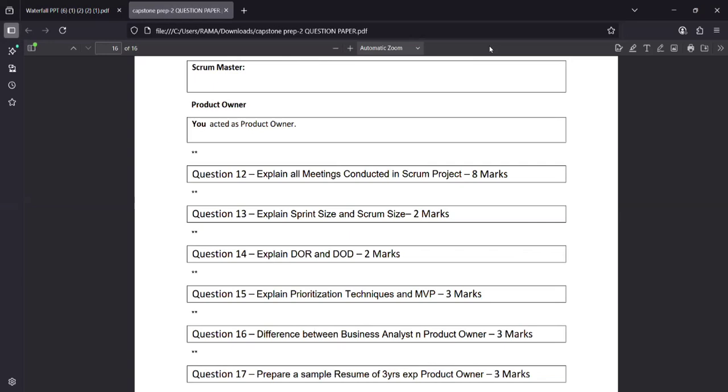From the 40 user stories, which are the most important to deliver first? The team will discuss and decide to deliver those user stories in sprint one. Let us consider we have decided on 5 user stories in sprint one. That is known as sprint planning: what should be delivered in the particular sprint. Let us know what is next.